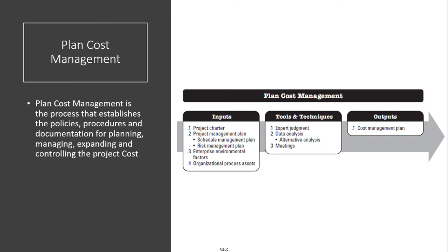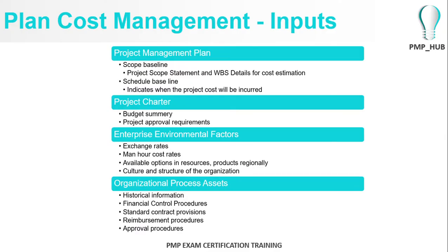So, as an input, the scope is obviously an input for this, and the schedule is also obviously an input of the baseline, because by the scope you know the entire WBS, the data is there. By the time of your schedule, the time plan, you had broken down into activity level. If you can recall what we discussed last time, the decomposition, where you break down the WBS into minute activity level to get the time plan, and that will be the basis to get the costing also.